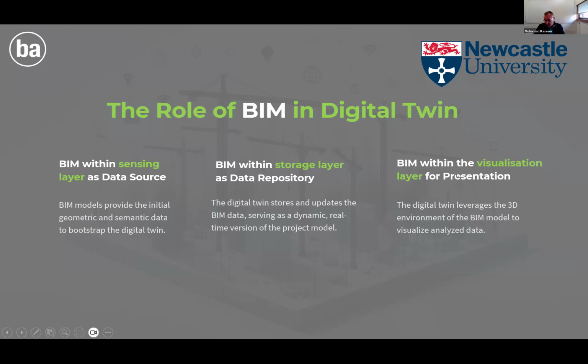So if we do that, what you see here is, for example, safety and risk management as an application, you can see here in the white circle. In this case, we are visualizing applications against technologies. You can see, for safety and risk management, RFID, load sensors, stress strain sensors are the most used IoT on construction site for this application. If you look at progress monitoring and control, you can find GPS, IMU, telematics are the top three sensing technologies. We have done that not only for sensing technology, but for every other technology layer.